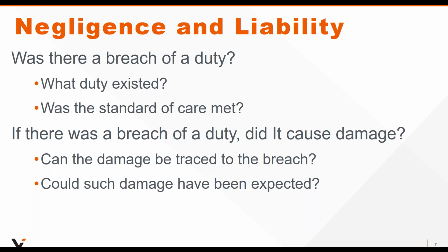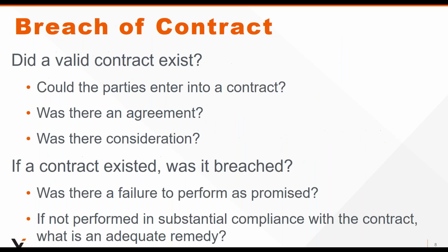And because we don't quite yet know, truthfully, what that standard of care should be. For example, when you're preparing preliminary drawings for the contractor to price the project in order to win the job, people call those drawings 30% completion to completed drawings. But what should that standard be? And what is reasonable under those circumstances? So in a lot of ways, the risks that you face are still being worked out about what is reasonable under these circumstances.